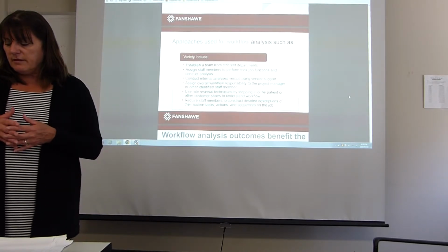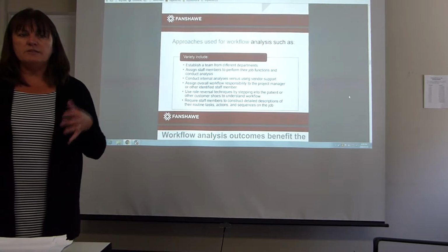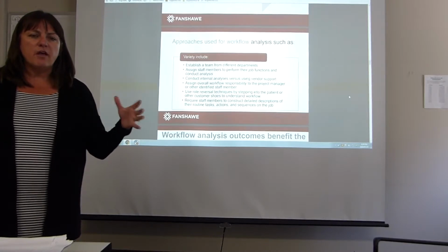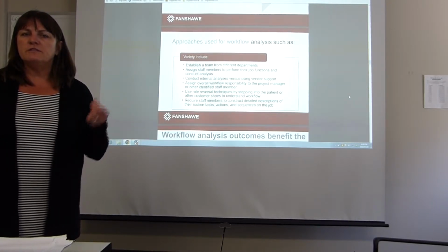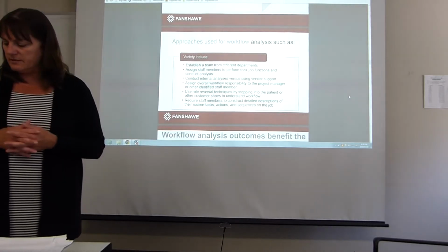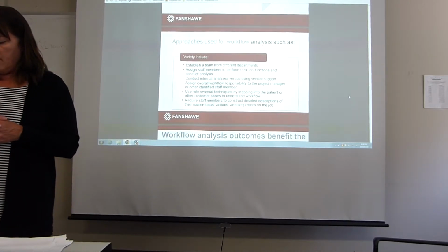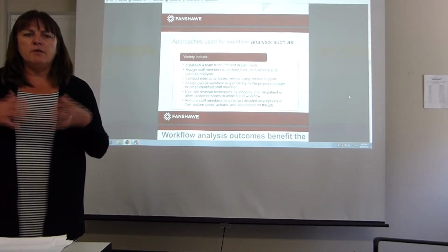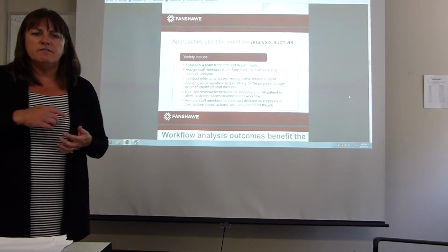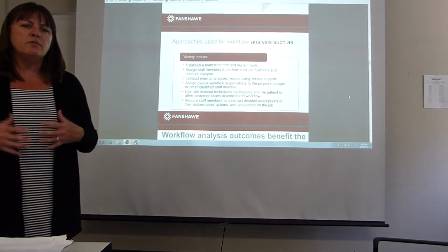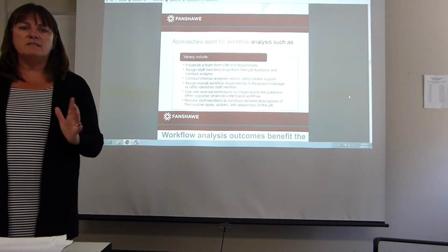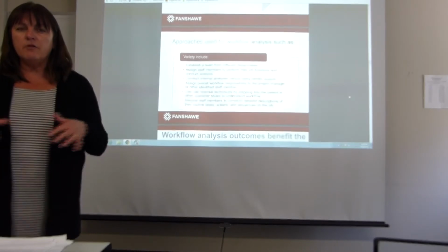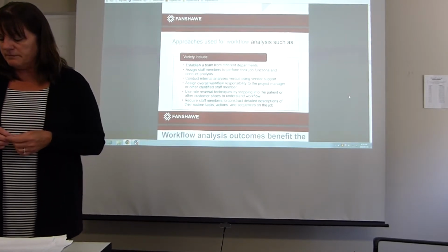We conduct the internal analysis sometimes by shadowing, by actually going to the current state and going through the process, being a fly on the wall, if you will, and just watching the person start the process from beginning to end. They use role reversal techniques by also stepping out of the process and putting themselves in the place of the patient. So instead of the staff and the clinicians working through that process, they say, okay, if I was a patient, what would I see? And how would I interact with this process? So that's often helpful to get a full 360-degree picture of that process.